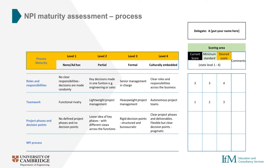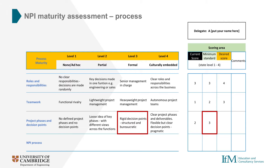Moving on to project phases and decision points: in our company, we generally have a loose idea of project phases, but exactly what these phases are often varies across teams. As such, we would score this category a two. We've had some real issues where untimely and fractured decision making has led to increased project costs, and so we think that we're probably currently below the required minimum standard here. With this in mind, we score the minimum standard as a three. We can really see the value in having clearer project phases and deliverables, and so we score our desired level as a four.